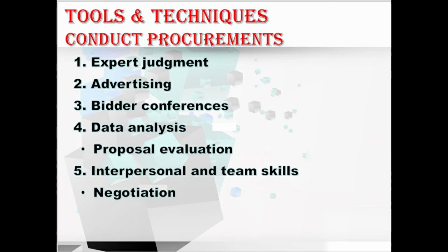Moving to the next technique, we have the data analysis technique, which contains the proposal evaluation. What is proposal evaluation? Mainly, the proposals are evaluated to ensure that they are complete and respond in full to the bid documents, procurement statement of work, source selection criteria, and any other documents that went out in the bid package. Hope you understood what the proposal evaluation technique is.